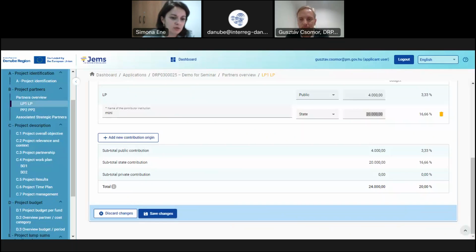And then there is a question, can you repeat please the lump sum intended for the preparation? As far as I saw, this comment comes from nearly half an hour ago, nearly 40 minutes ago. I think that I have already answered this. Yes, for the following question, the total 18,500 is the total preparation cost, and we are reimbursing 80% out of that. The rest is co-financing and can be reimbursed from state co-financing if it is given.